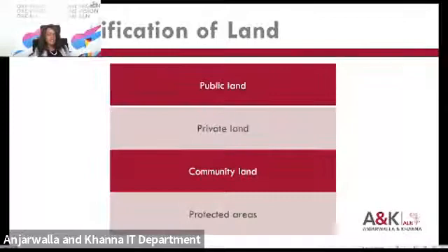So there are fewer statutory restrictions in this area, but it might also be protracted, because if you require large tracts of land for a project, then the project company might be compelled to negotiate with each individual landowner that is along the route for the land required for the project.